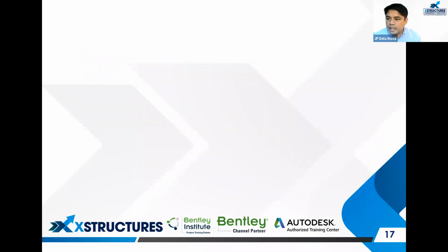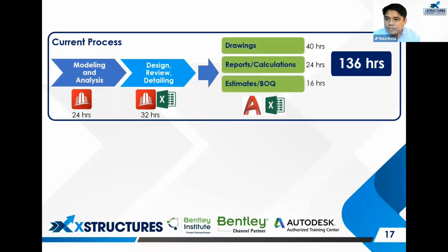Okay, so this is how I break down the 136 hours. 24 hours will be for modeling and analysis. Another 32 hours for design review and detailing. Then 40 hours for drawing preparation from scratch. Reports and calculations will take around 24 hours, and the rest for estimates and BOQ, totaling 136 hours.